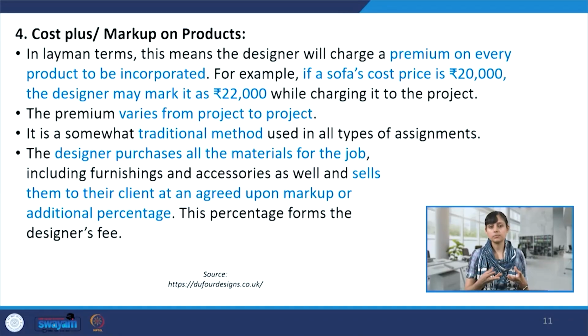Then there is a cost plus or markup on products method. Basically, the designer charges a premium on every product that is incorporated within the design, where he or she is giving their services in procuring those products, designs or furniture pieces.